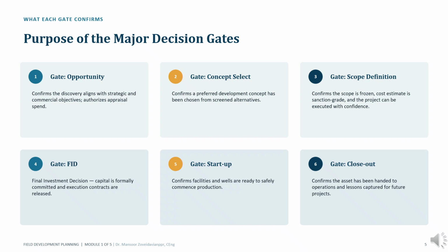The final investment decision, or FID, is the point where capital is formally committed and execution can begin. The startup gate confirms that facilities and wells are ready for safe production. Finally, the closeout gate ensures a successful handover to operations and captures lessons learned for future projects.